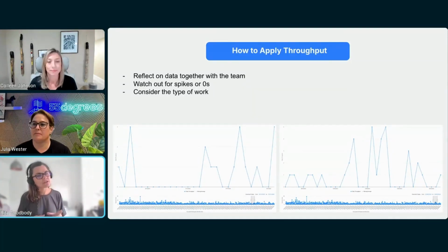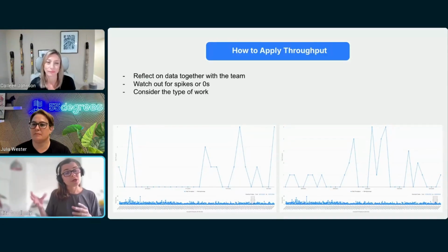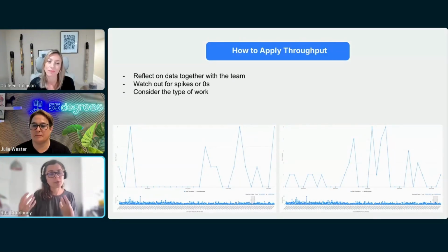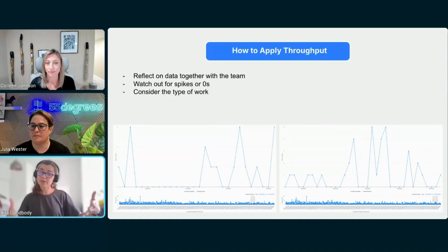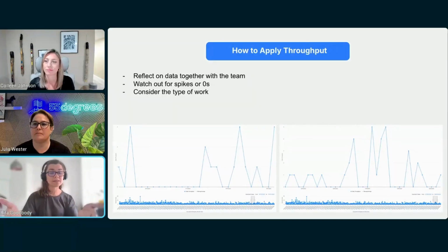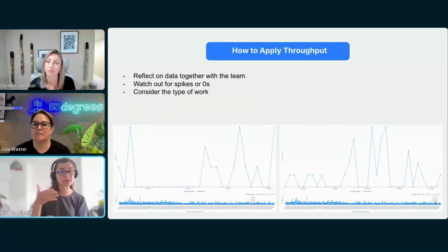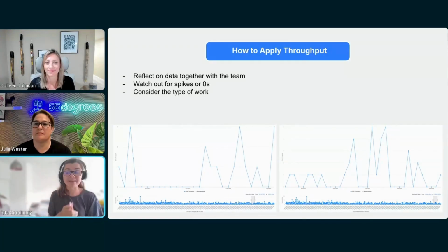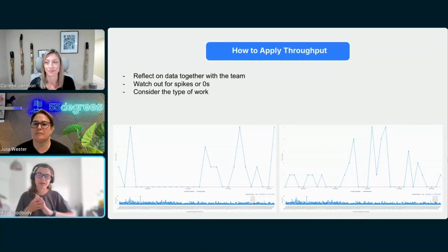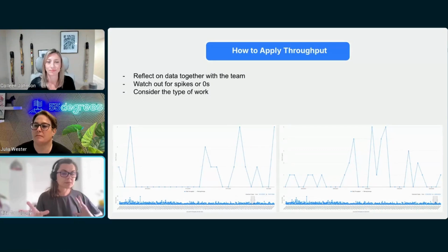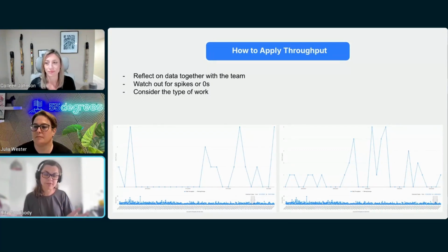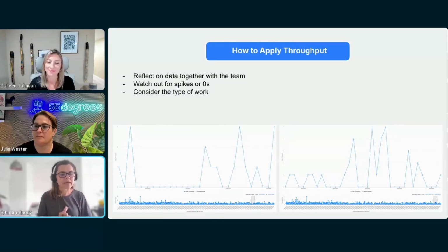Starting these conversations with stakeholders, with the wider business, was extremely useful, because we provided something that we could work on together. And we said, if we want to deliver this on time, either we need to cut the scope, or we need to look for other teams who could support us and come in and share the load. And exactly that's what we did. We had quite a good amount of people in other teams who knew the domain, the knowledge and everything, and they were picking up some of our work. We delivered on time as per deadline, and it was achieved.